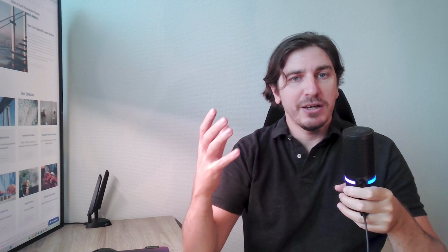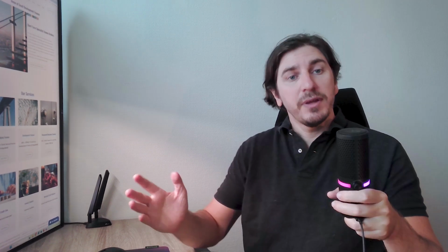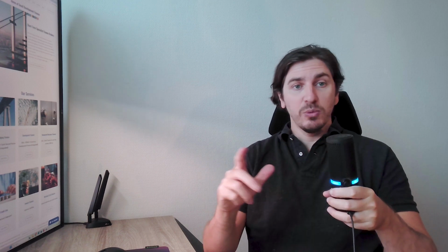So there's a big cost, and then it will drop down as you start doing the internals where the costs are smaller, like the kitchen's a fraction of the roof cost. But this gives you a good idea of where it's going to be, but won't be exact. So that's something to bear in mind when you're looking at any of these illustrations. It's calculated when you draw the money as opposed to this illustration. That's basically what they look like. It's always worth bearing in mind every single one will be different.